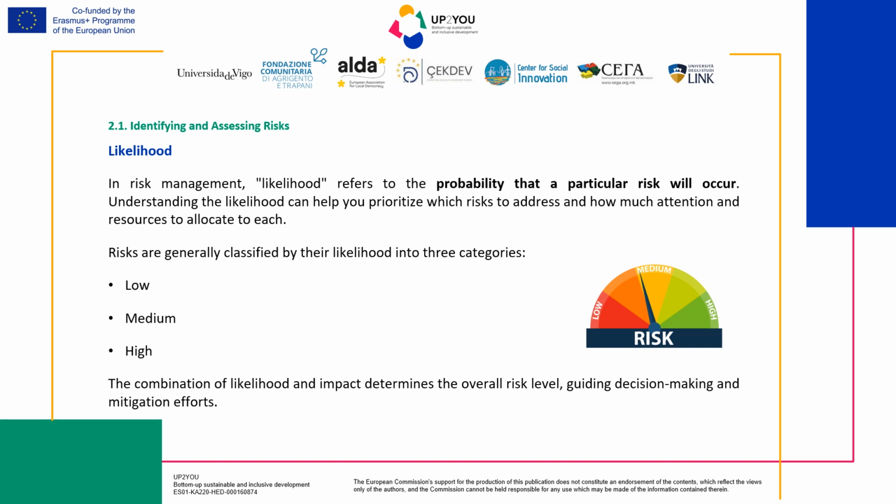Note that the overall risk level of a particular issue is determined by combining its likelihood and impact. This combination guides how project managers prioritize their risk response strategies and make decisions to ensure that the project stays on track.